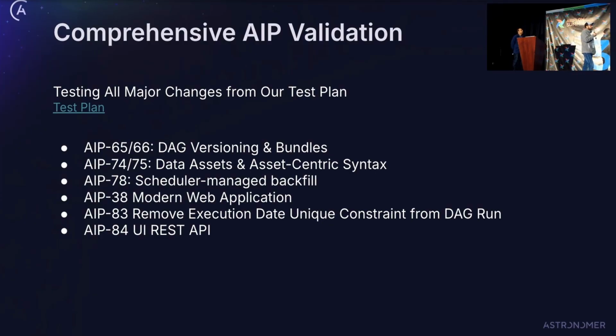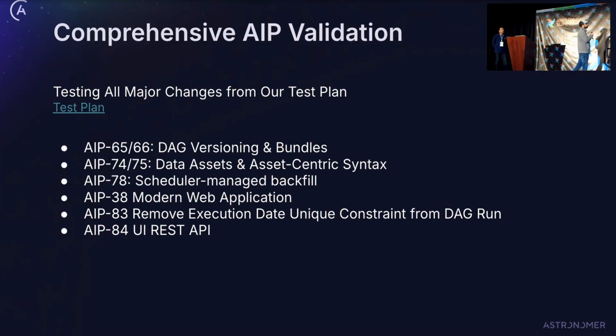So to do that, we had to test thoroughly with this, right? And what we did was we created a manual test plan initially, right? And we followed that with every change in new release of alpha, beta, and RC. We executed these tests initially manually, and we are now automating them right now as we speak. Most of them are done as well. Having positive and negative test cases around that and getting them reviewed by the community really helped us. We also asked the community that they can help us test that.